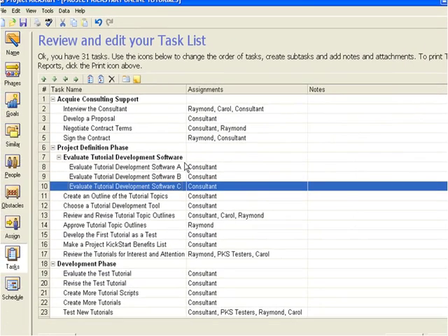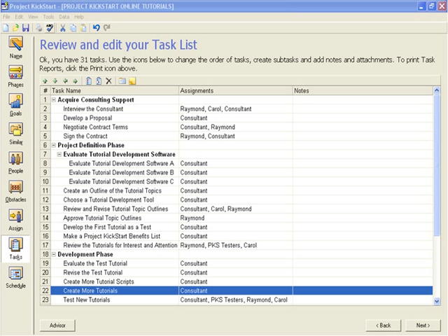Now here's a planning tip. It can be tempting to continue to break tasks into subtasks and subtasks down into sub-subtasks, but this is not necessarily a good planning practice because project plans work well as guidelines, not as micromanagement tools. As a rule of thumb, 95% of planned tasks should be between 1 day and 3 weeks in duration. If a task is shorter than a day, it is usually an event or milestone. If a task requires more than 3 weeks, it's a good candidate to be a phase or to become a task with subtasks. Now let's see how to edit and enhance individual tasks.